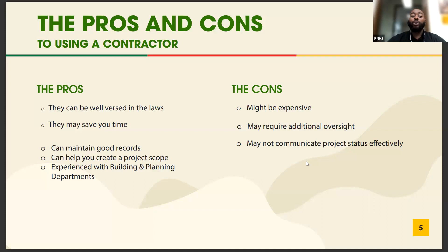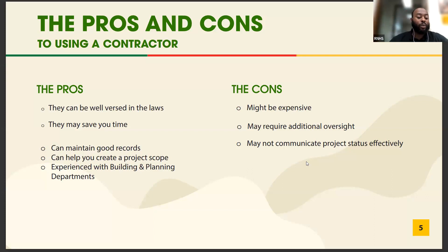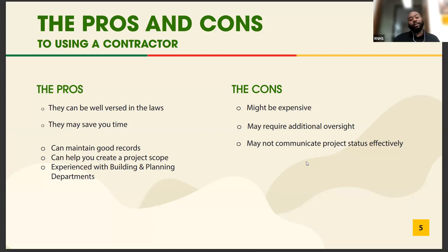Your general contractor or architect takes your plans and submits them to the city. About three to four weeks later — sometimes longer — the building or planning department will respond with questions about the design. They'll line those up against the city's legal requirements and may ask for comments back. It is the contractor's responsibility to manage that communication — not yours.